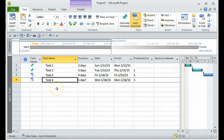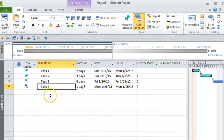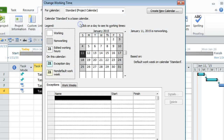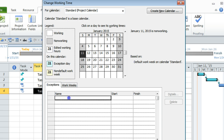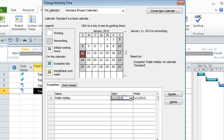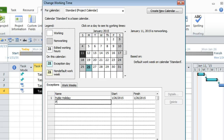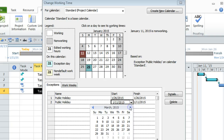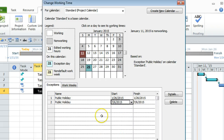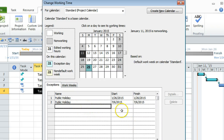The next thing is how to add holidays, which you should also do at the beginning of the project. Go to Project, click on Change Working Time. You'll see that the standard project calendar is applied. I'm going to add holidays — for example, in India we typically have a holiday on the 26th of January which is Republic Day. For teams working in the US, the 4th of July is Independence Day, so let's say the 6th of July is marked as a holiday.